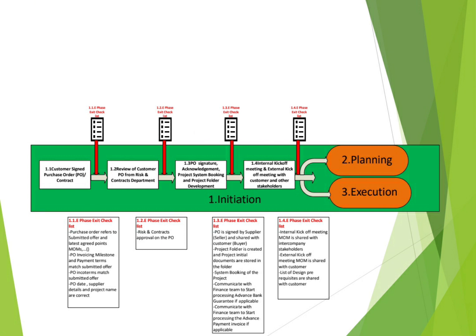Next, it will be 1.3, the PO signature and acknowledgement to customer, and project system booking and project folder development. So you need to have the project folder in place with the subfolders as per your company template in place. All of this needs to be checked by the project manager.